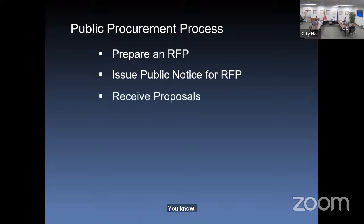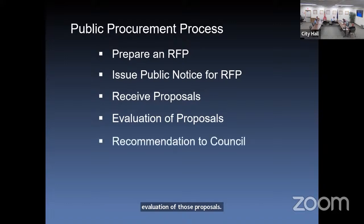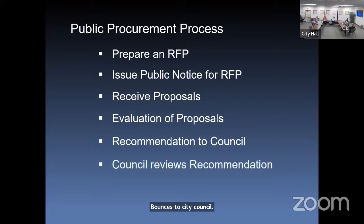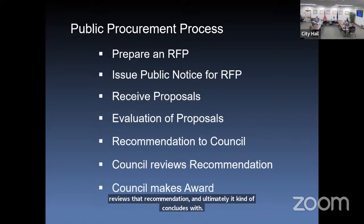DJC stands for? Daily Journal of Commerce. Thanks, Chris. And then after it's been out on the street and suppliers have had a chance to work on the RFP, prepare one of their own and submit it, then we receive those RFPs, the proposals. And then it comes back to this committee again for an evaluation of those proposals. And then it bounces to City Council. You'll forward your recommendation to them. Council reviews that recommendation, and ultimately it concludes with a formal award to an equipment vendor for said equipment.